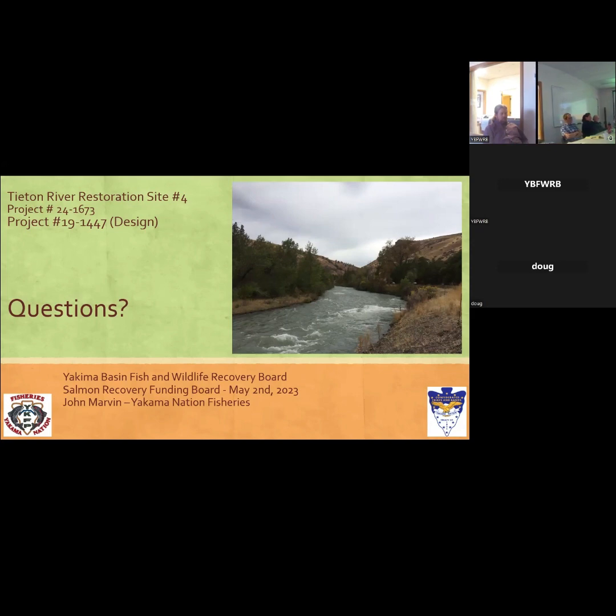I'm trying to remember the wording in the targeted review criteria, but it does talk about scope and scale, and how the funding can accelerate. When does the targeted funding become available? It will depend. If the CCA is maintained and if the project is in the top 25 million at the state level, it'd be available in January. Otherwise, it would be at the whim of the legislature, and if the legislature chose to fund the list far enough down to hit a project, the funding could start July 1st, but you wouldn't have a contract until August or September, likely. And the latter is more likely.